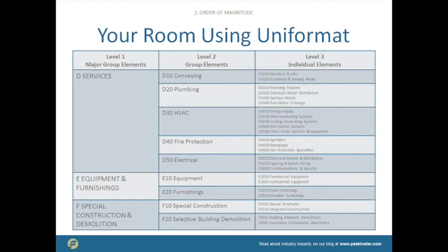So that makes the estimate comparison hard. So if you're the owner or the owner's representative, if you start out with an estimate format, if you can then require anybody who wants to bid on that project to deliver their numbers in that same format so that you can do comparison, it's very powerful to do so, and I highly recommend it.